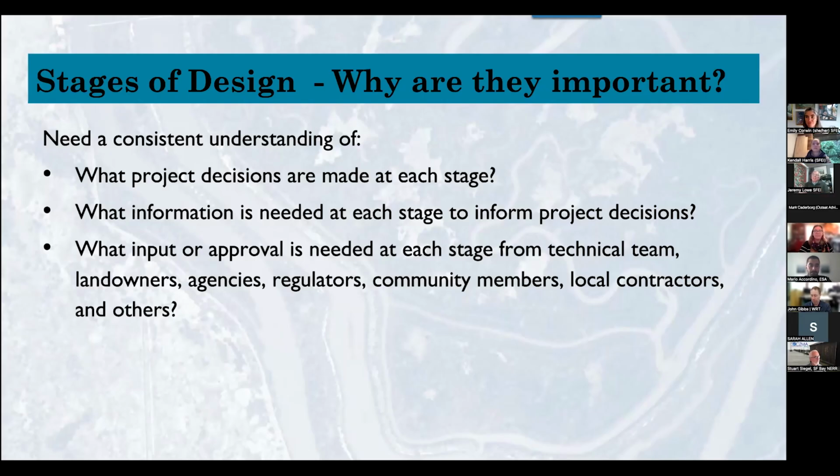If the design process is unclear, or if the confirmation or approval process isn't consistent, it can cause delays, can cause the need to do redesign because we've got to go back and make a better decision. And it can, obviously, that always leads to extra costs. And in the worst case scenario, it could lead to a project where the landowner is not fully on board and we need to change their mind of how they're participating in the project. Or it could be that there's insufficient budget or insufficient materials to complete the project at the end. So all of these are trying to reduce the risk related to project implementation.